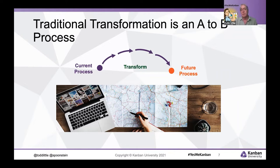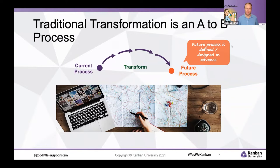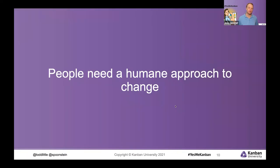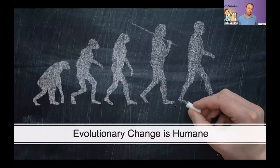There's a second problem: we are dealing with people. People and organizations go through changes in different ways. What Todd is talking about is how people resist change — but they don't resist change necessarily, they resist being changed. From the Kanban University perspective, people need a humane approach to change. Change that is evolutionary in nature is actually humane — the idea of changing little by little, piece by piece, is what we're talking about here.